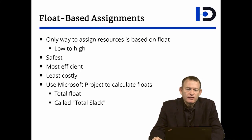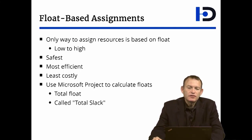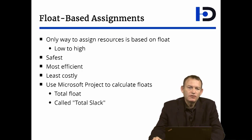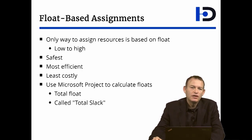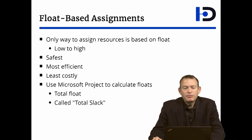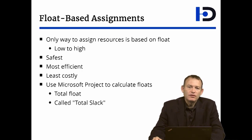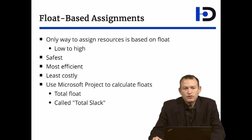Writing software emphasizes that the only way to assign resources to your project is based on float. You don't assign based on what is more important or what the customer wants to see. You assign it solely based on float, low to high.